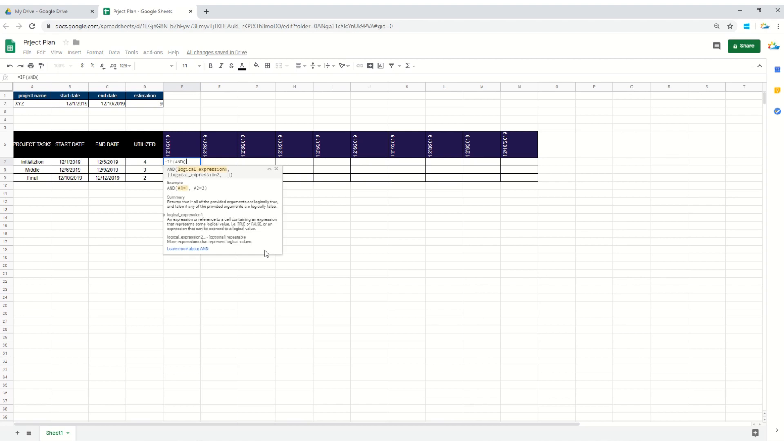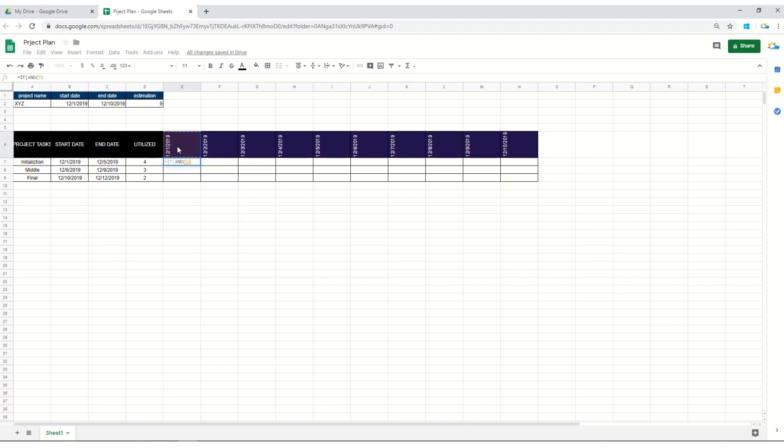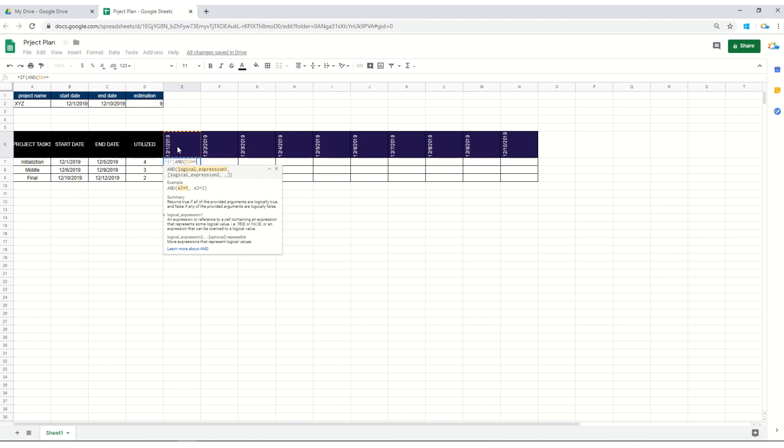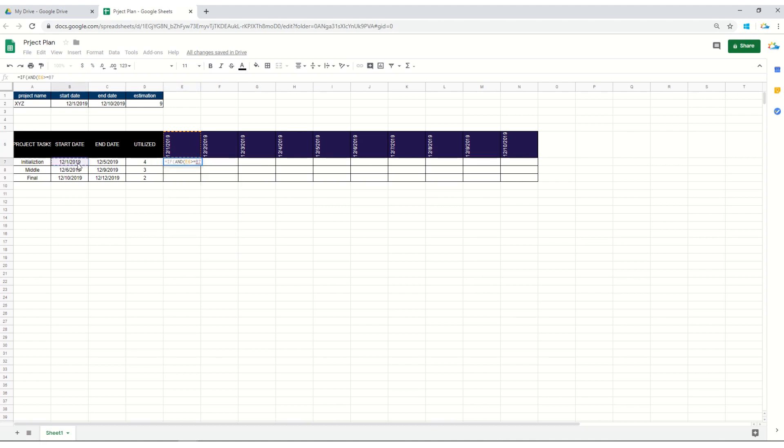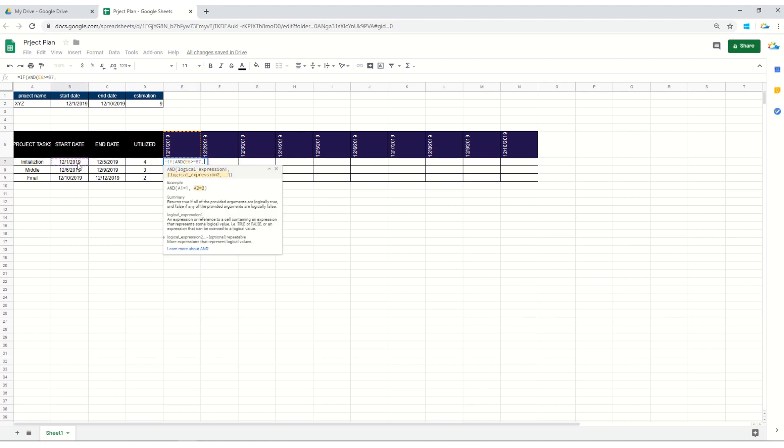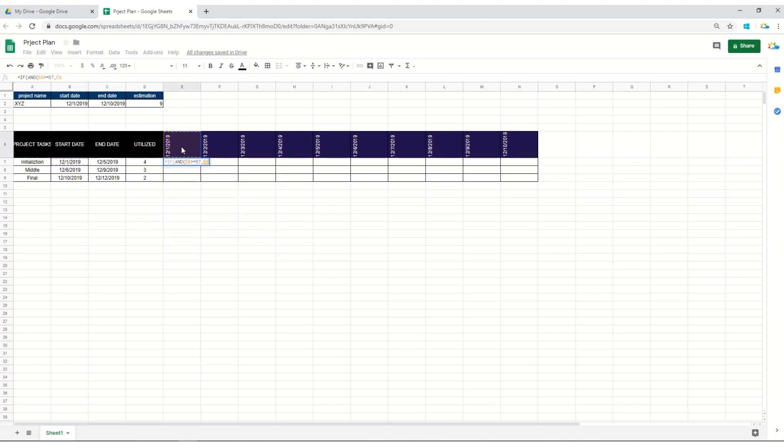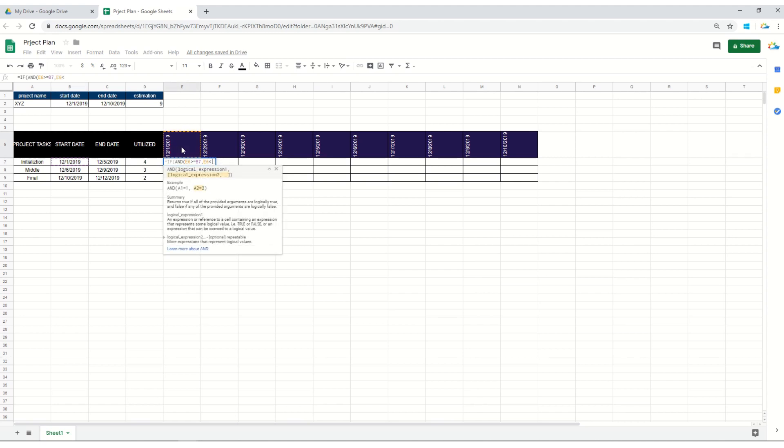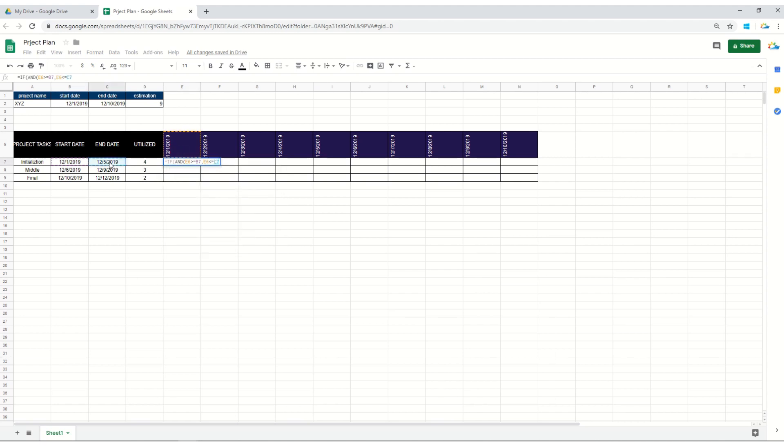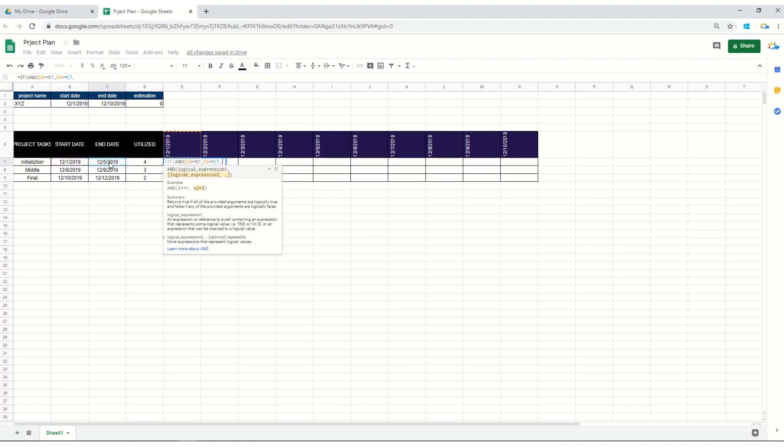Or if this date is less than or equal to the ending date of this particular task. This will make sure that the project lies within the utilized number of days. Let's keep it ON, and in case the result is false there will be a blank space.